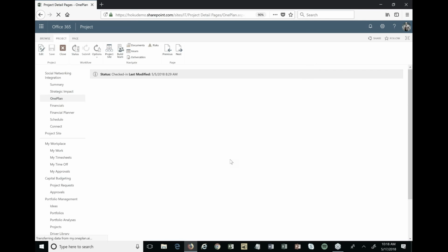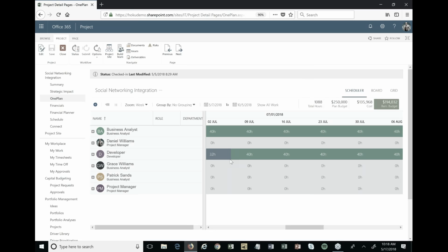And so I'm going to build out a high-level resource plan. At this point, I don't have to go and build out a very detailed project schedule, so I don't need to necessarily go and put in 10, 50, 100, 1,000, 2,000 tasks. I'm more just trying to understand at this point, what types of resources am I going to need, for how long, and how much. So we can get an idea, is this a 5-person project, a 10-person project, a 100-person project?